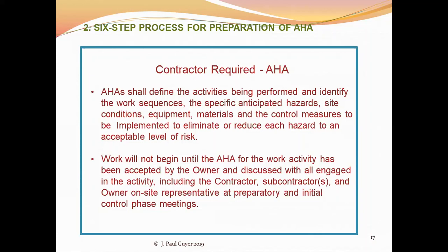And generally speaking, the way things should work is that after the construction manager or supervisor has prepared the activity hazard analyses for a project, they need to be submitted to the owner, and the owner will most likely sit down with his insurance carrier and go over them.